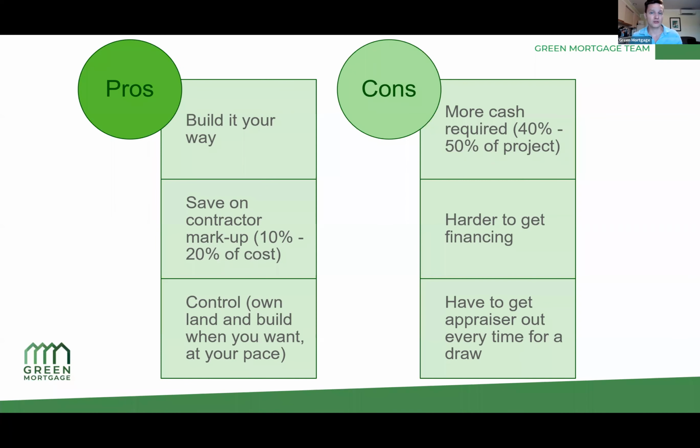One of the biggest frustrations that we see is there's a lot of pressure for the homeowner to make sure that they've met the stage required by the bank to be able to get the financing. A lot of banks say you have to be at lockup, and let's say that the lockup is 40% complete. You think you're at 40% complete, or you think you're going to be there in a week. And by the way, you have contractors saying, we need to get paid, we need to get paid. And you say, hey, I'll pay you once I get paid. Then you rush it. You get the appraiser to go next Friday when you're being told by the contractor that it'll be finished by that point. And then the appraiser says, yeah, you're 38% complete.